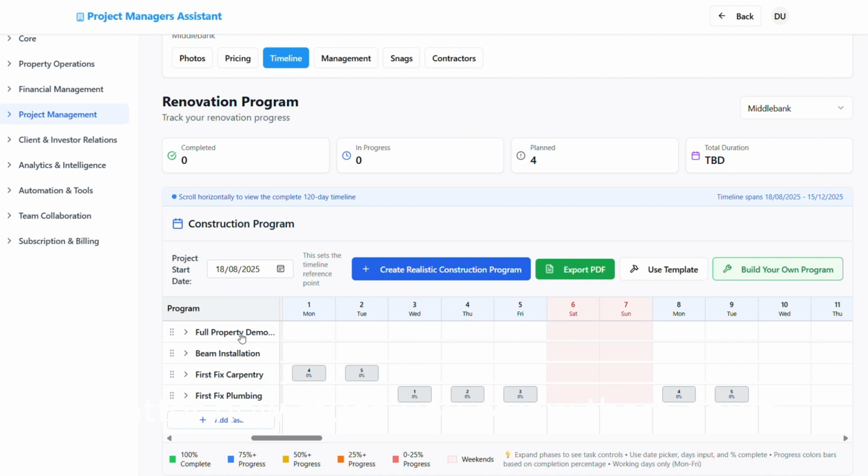No matter how much you screw them down, how well you fix them, it might not happen now, but at a later point, there's going to be movement. It's never going to be as good as the floor was when it was originally made. That's why we don't like to take floorboards up. You do everything from below. So you take all your ceilings down at demo stage, and then you can do all your first fixings from below, and it's a better job. Plus, you've not got any chance of anybody falling through floorboards, which is another health and safety issue.